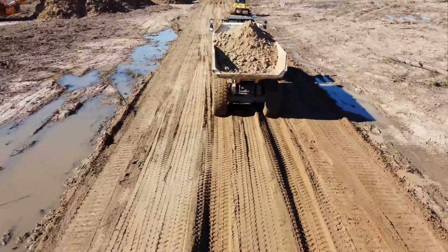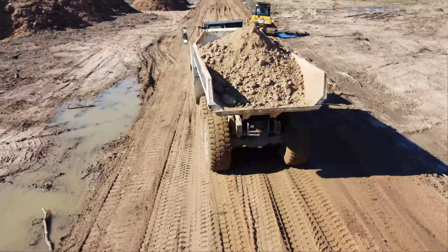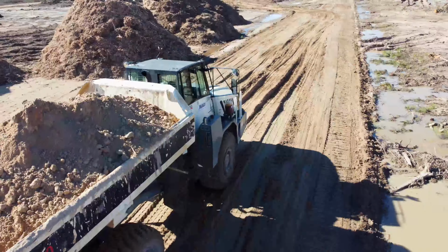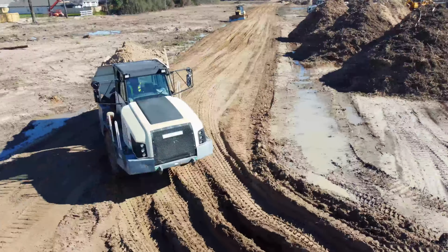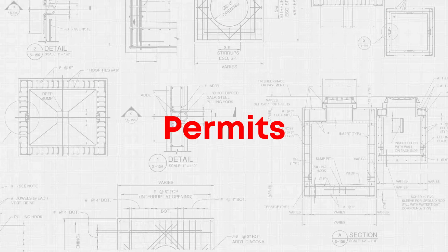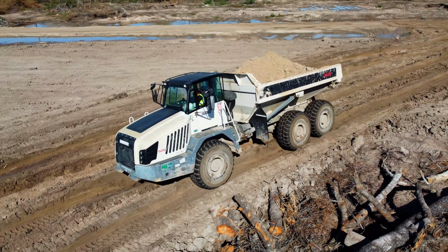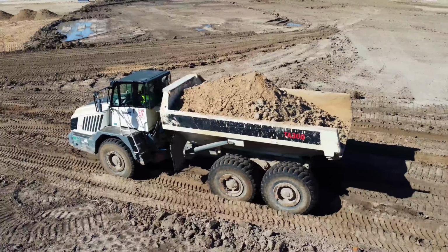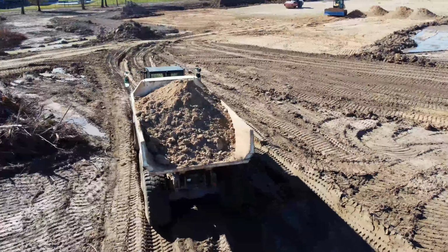So, what do engineers deliver as all investigations, calculations, and design are done? There are several deliverables that are provided to the client. First, permits. All permits that are required by local authorities, city or county, are paid for and acquired by the engineering team and are delivered to the owner.